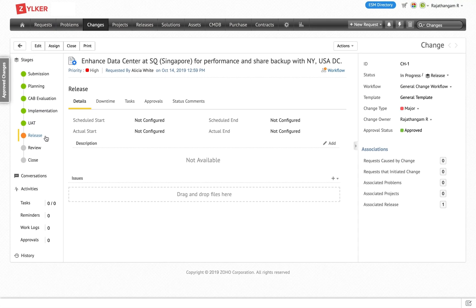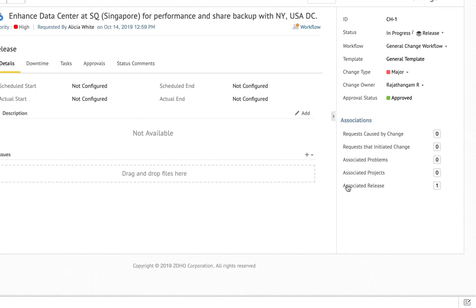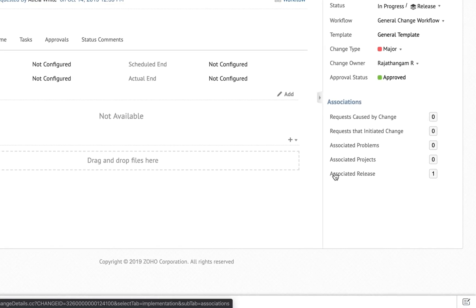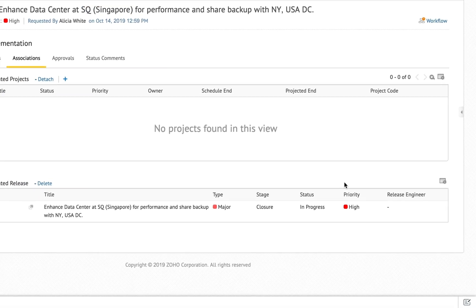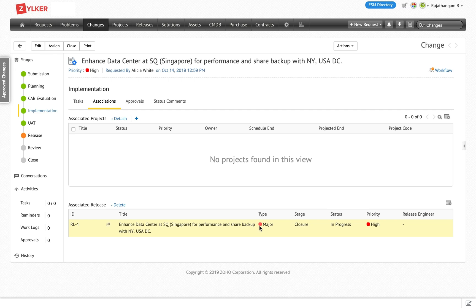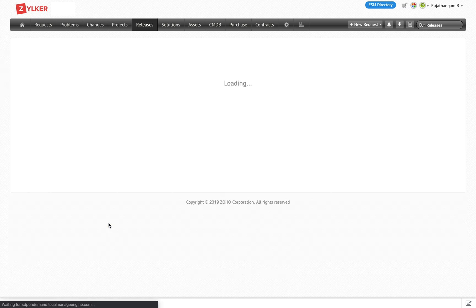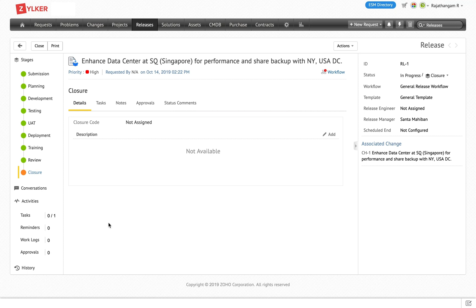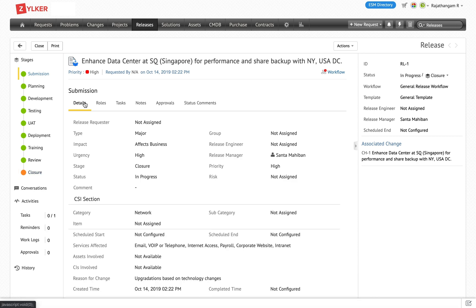With a release, you can either create or associate a release from a change record. Since there is a release already associated, I can navigate right into the release from the change record. When creating a new release from a change record, the data from the submission stage of the change request is carried over to the release submission stage.